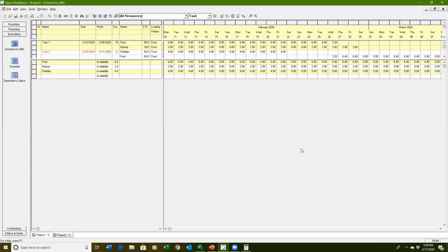And by the way, I could duplicate and put hours and then put another resource assignment right underneath it. Then I can turn it into cost, and I can have the hours and costs stacked on top of each other. It gets to be a little busy, but it's certainly doable. So you would baseline this, and then when you baseline it, now you have to start clocking your actuals.